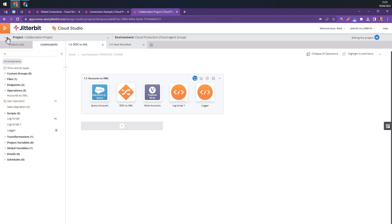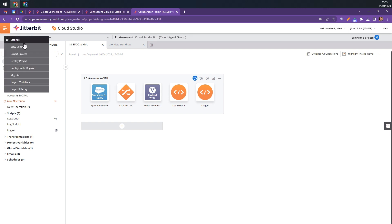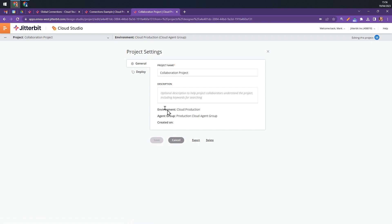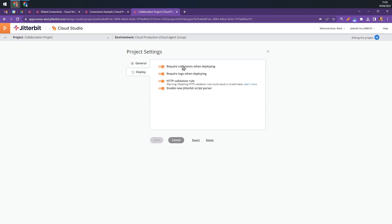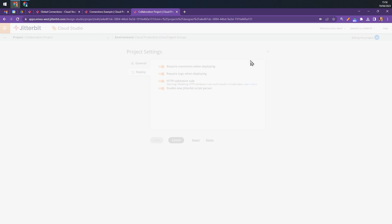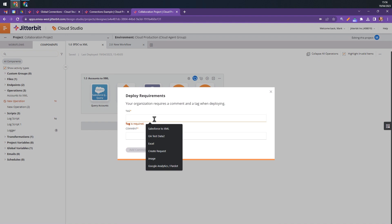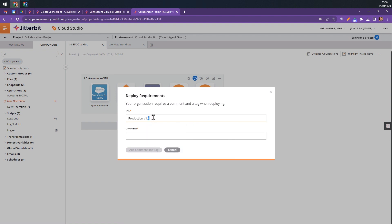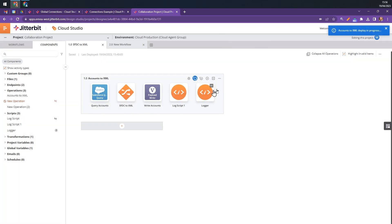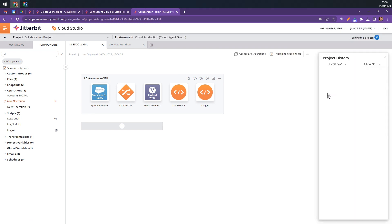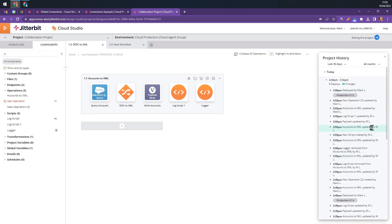Lastly, talking about project history — if I go to Settings and under Deploy, we can require comments and tags when deploying. It means that when changes are made and deployed, we're forced to add a tag. So let's call this production v1.5, and I'll do the same for the comment. That's now being deployed with those comments and tags. So you've got a level of change control, and if we go into project history, you can see exactly who made what changes and when. Those tagged and commented deployments are highlighted here.